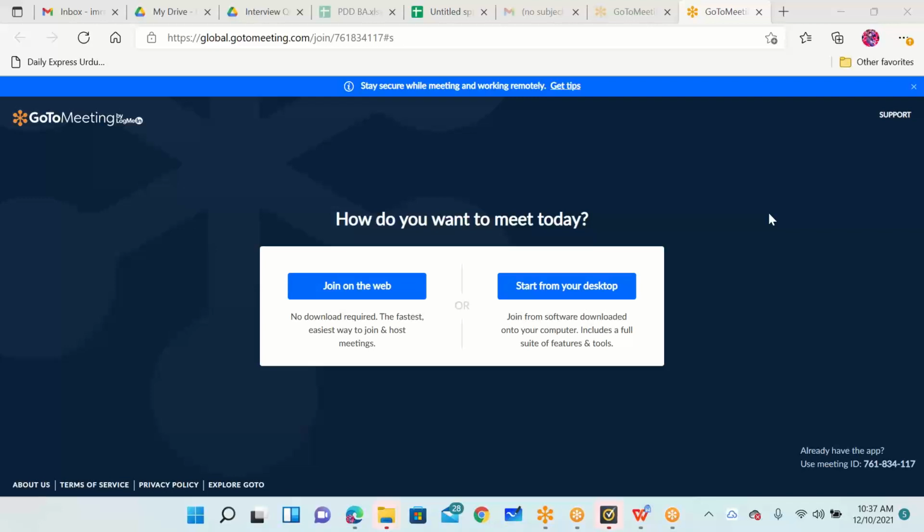Hey, I have one question. Yes. It's a very silly question, I don't even know how to answer it. Who will give sign off to BRD and FRD? There is not going to be one team giving sign off to BRD and FRD. If you look at my Barclays BRD and FRD, you will see the IT director on my IT side signing it off. My project manager is signing it off. Then the QA team lead is signing it off. Then the development team lead is signing it off. But on the other side, there are one or two product owners signing it off. And then the top level management, the country head or whoever from our investment banking side, is signing. So there's no one person.